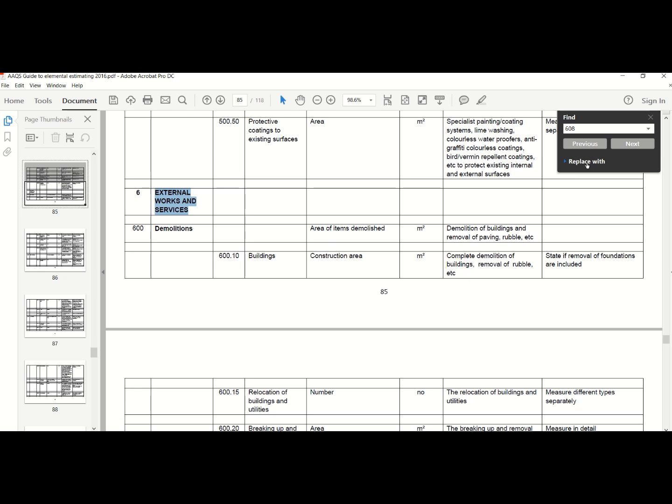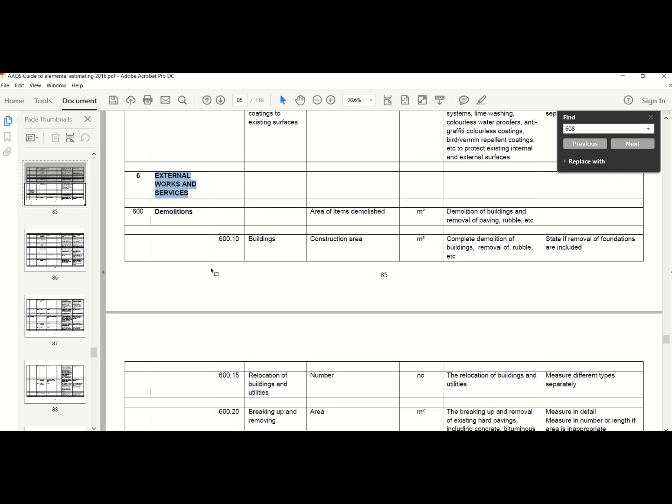So that's the electrical work, usually per square meter, or I've seen people doing it per number, although the per square meter estimation is usually the easiest to take the historical data to get the new rates. Okay, so that's more or less how the electrical installation works.